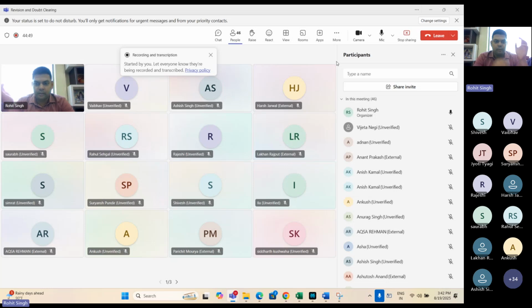We divide the complete project into multiple epics. Then we further divide one epic into multiple sprints. Then we further divide one sprint into multiple tasks, and one task into multiple subtasks. So that's how we do the work breakdown structure. And with each unit task or subtask, we deliver it to the client.